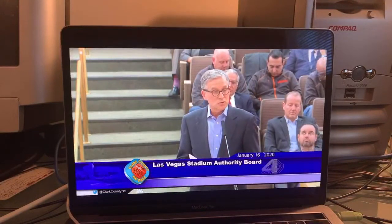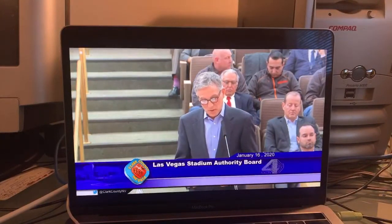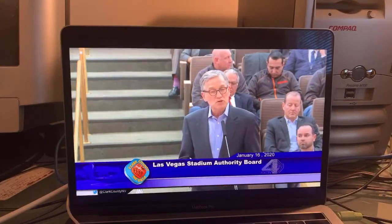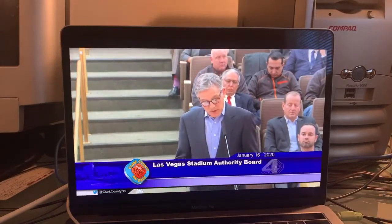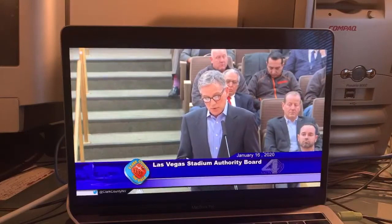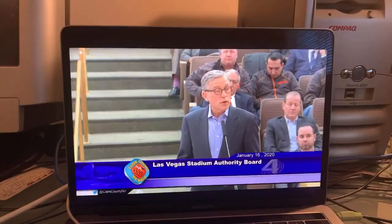Now, the Grand Canyon report correctly notes at least 8 separate times that the completion of the construction will be on time. And Tony has reiterated that multiple times here this morning. Secondly, it correctly observes that many mission-critical items, such as mechanical equipment and food service equipment, are ahead of schedule. And then finally, it conjectures that the completion date may be in jeopardy if rain causes damage to interior finishes. It's not that this conjecture is incorrect so much as it is irrelevant.